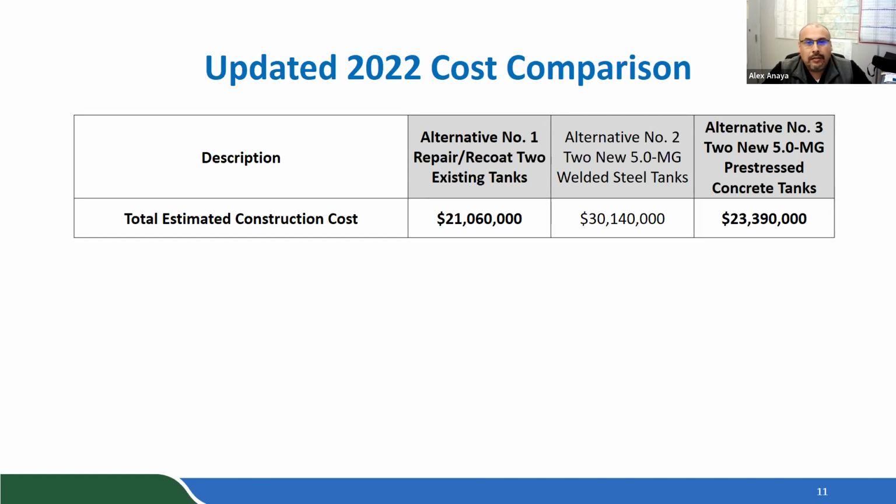So in either circumstance, that would be the process of doing this, because these tanks are important, as Director Bragman said. They're a key integral part of our transmission system. So we can't take them off both at a time. These would have to be done one at a time over a 2-year time frame.